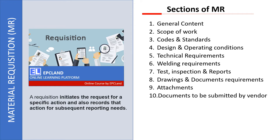All these attachments will be prepared by the purchaser, covering all the technical requirements for a particular project, and will be shared with suppliers and manufacturers so that both are aligned on the requirements. The vendor will comply with all these attachments, and this is how the technical requirements for a particular item are covered in a specific material requisition.